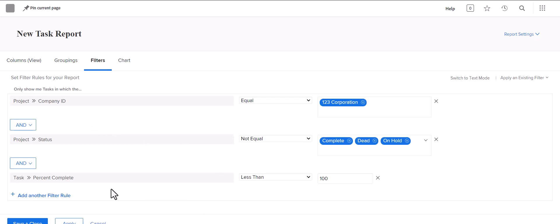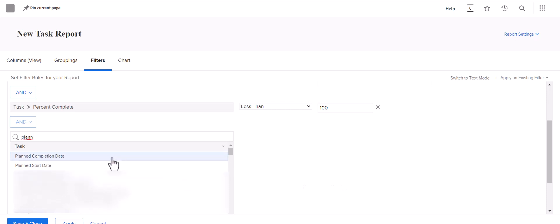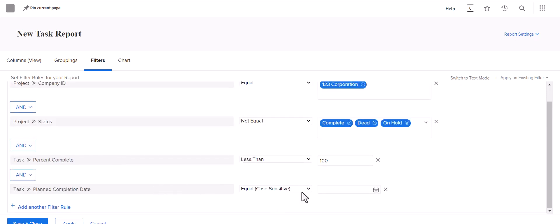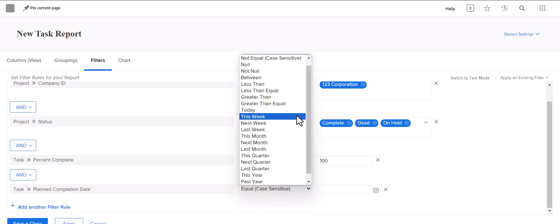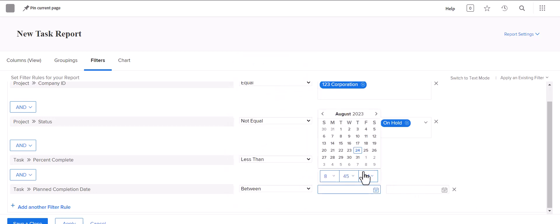If you wanted to put a time constraint on it — say, I want to see tasks that are open but are only due within the next two weeks — you could add another filter rule for the planned completion date, which is ultimately the due date. You can select specifics there: you could just say 'this week' and it'll pull anything for this week. You could do 'between' and select very specific dates if you're running a finite report.